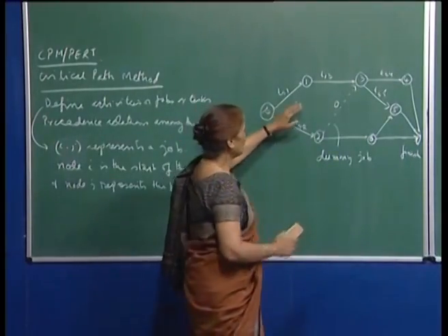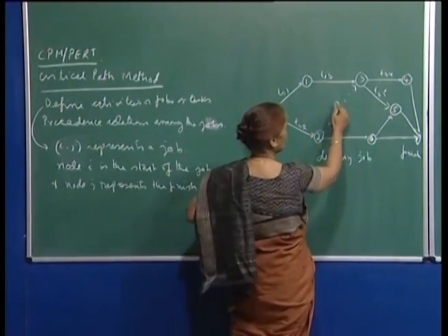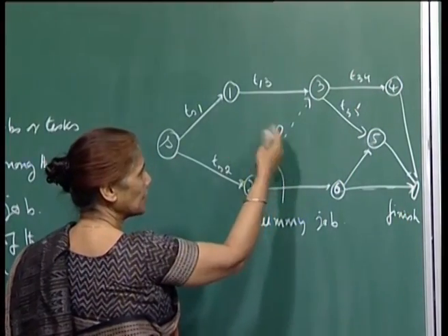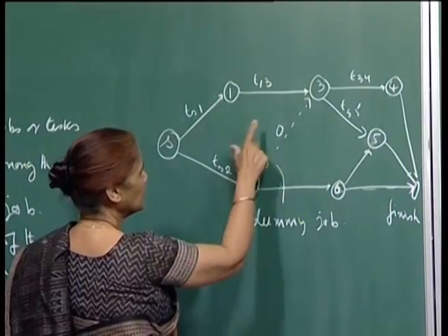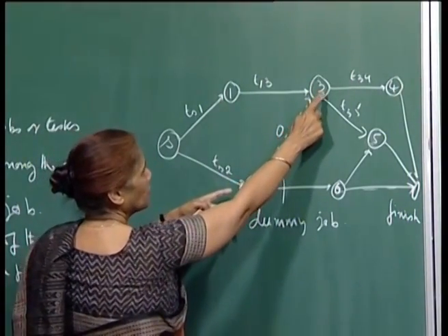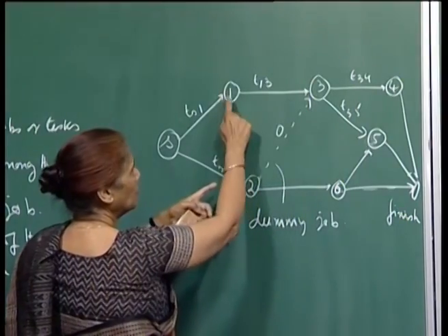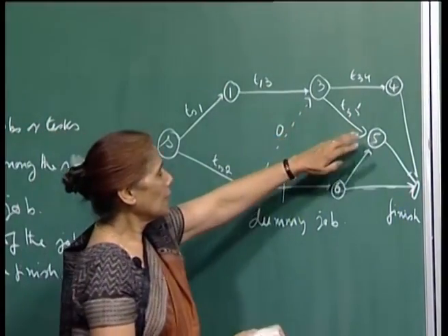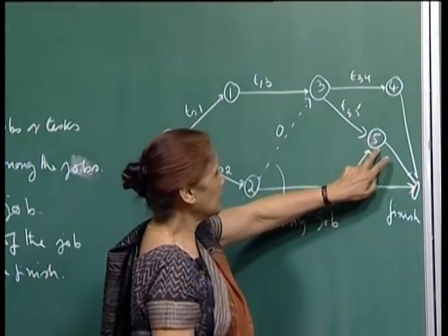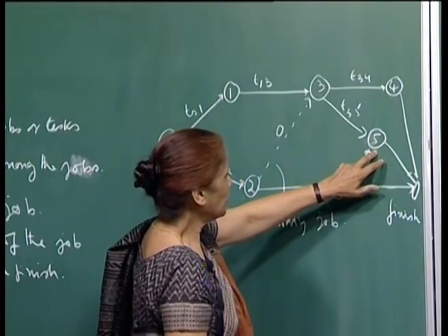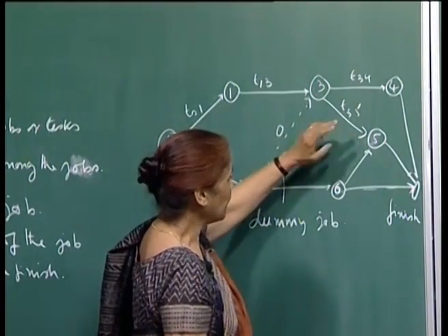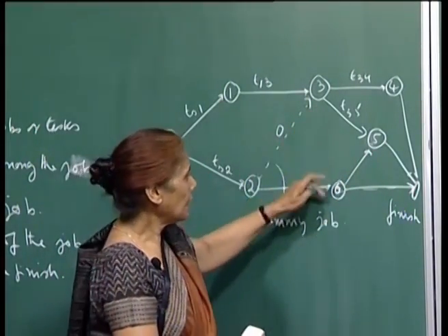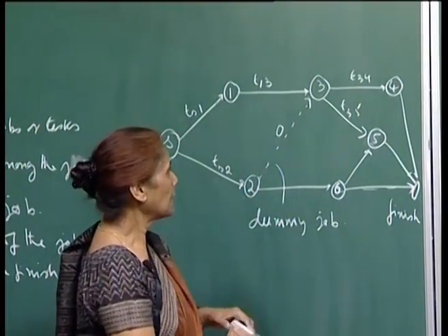Okay. So, therefore, by doing this and saying that it requires no effort, no resources, so I am putting a 0 here, that means the duration of this activity is also 0. So, therefore, this now shows that the event 3 can take place only once the jobs 1-3 and S2 are completed. Okay. And then so what I was saying is that here, for example, at this point I can say that this is also the finishing point of time of job 3-5 and 6-5, but actually node 5 denotes the finishing of both the jobs 3-5 and 6-5. So, this clarity has to be there, right.